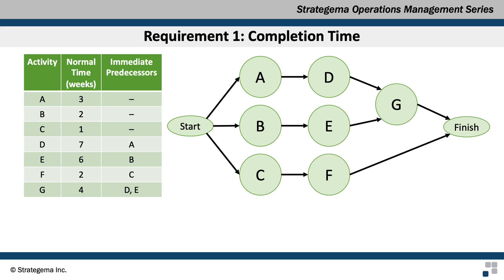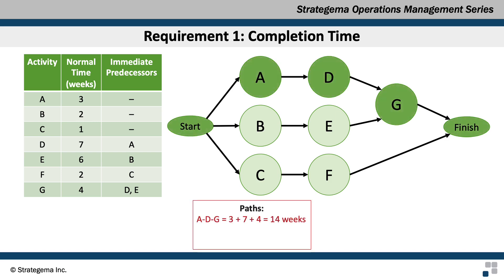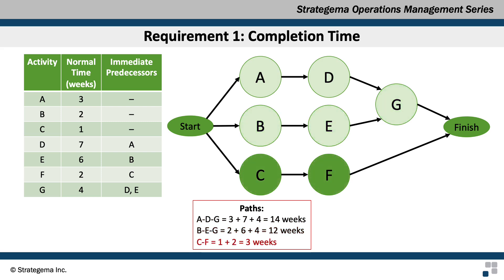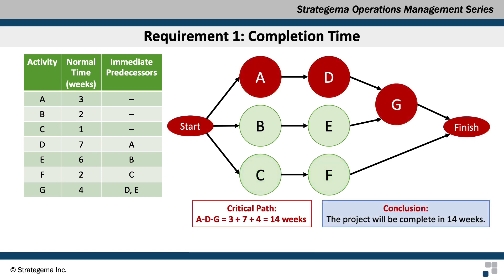Now we can determine all of the paths through the project along with their completion times. Path 1 is A, D, G with times of 3, 7, and 4 weeks for a total of 14 weeks. Path 2 is B, E, G with times of 2, 6, and 4 weeks for a total of 12 weeks. Path 3 is C, F with times of 1 and 2 weeks for a total of 3 weeks. Our critical path is A, D, G for a total of 14 weeks since it takes the longest time.